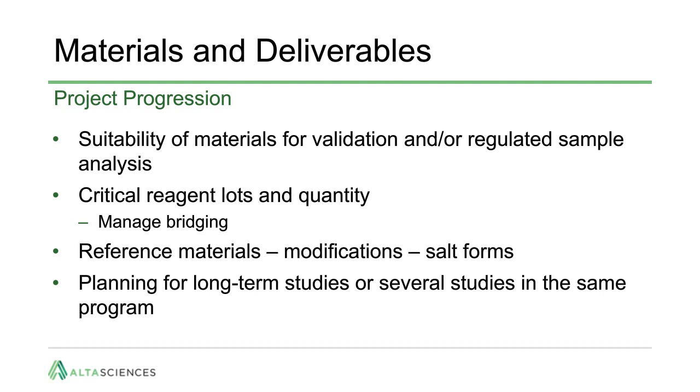Reference materials may be modified along the development pathway, for example, new salt forms. Potency adjustments are simple. Existing methods and solvent used for stock preparation should also be evaluated due to the modification. Success or challenges in the development pathway often result in additional studies. With the expansion of the program, the quantity of materials available is a key consideration. In case of specialty materials, there should be proactive planning for long-term studies or several studies within the program, and procurement timelines need to be considered.